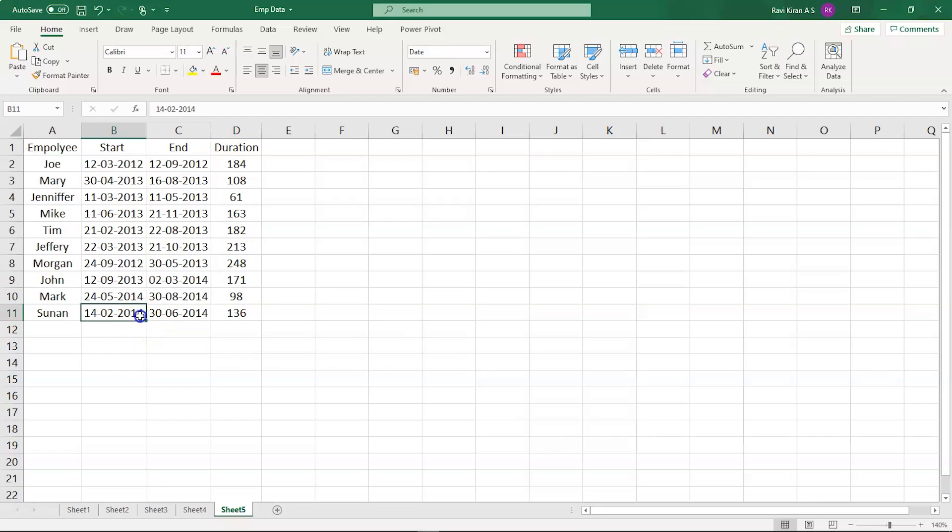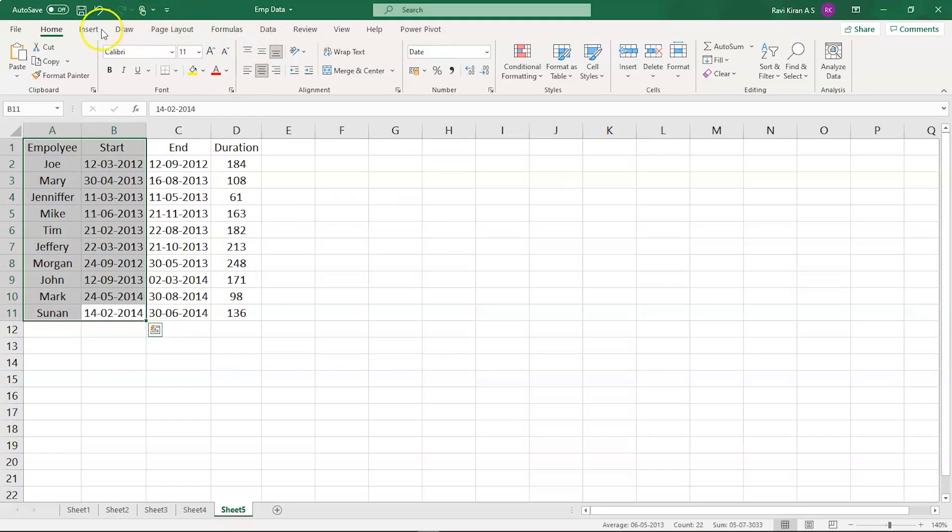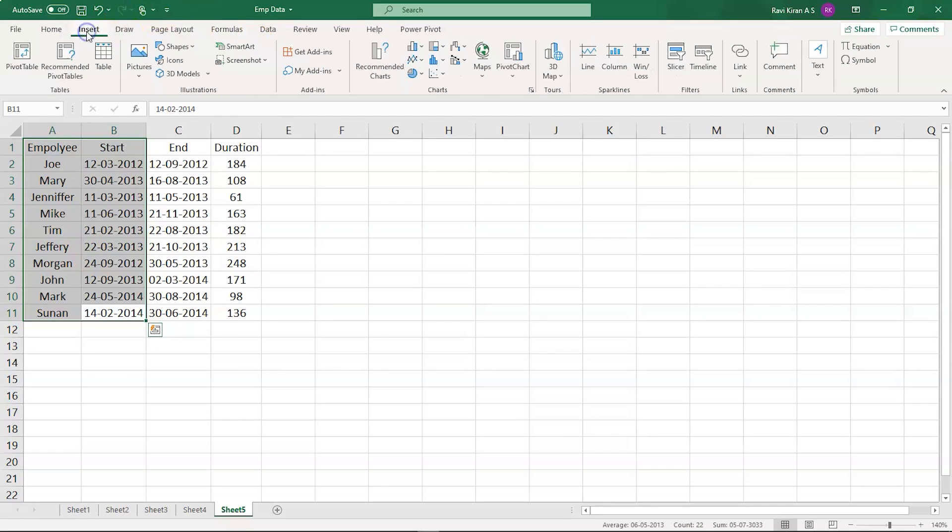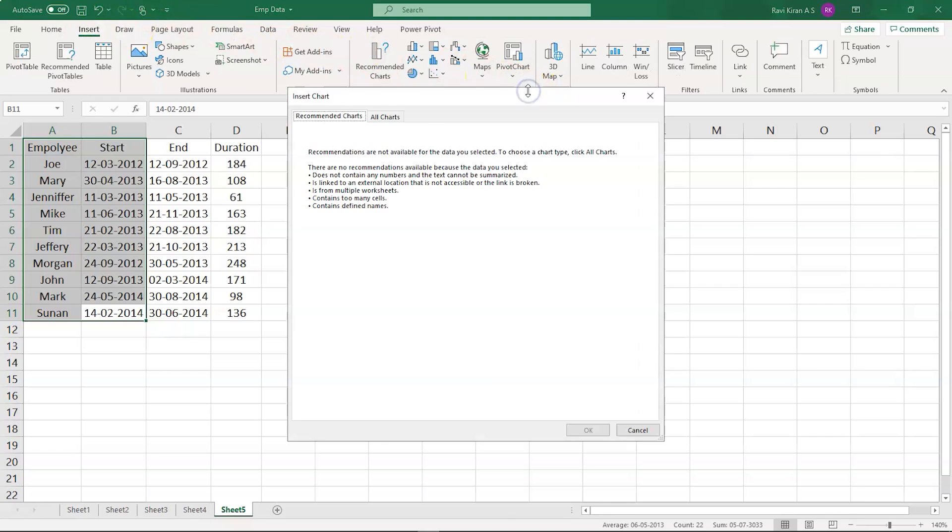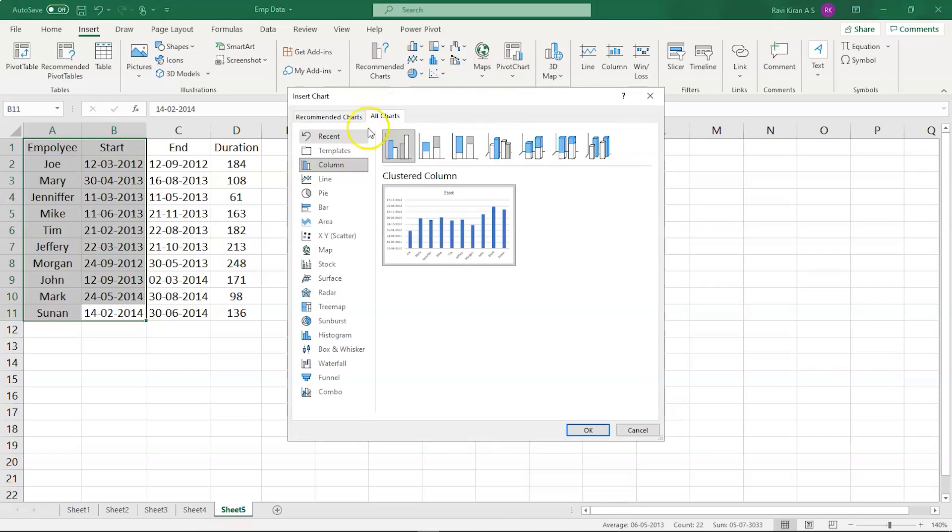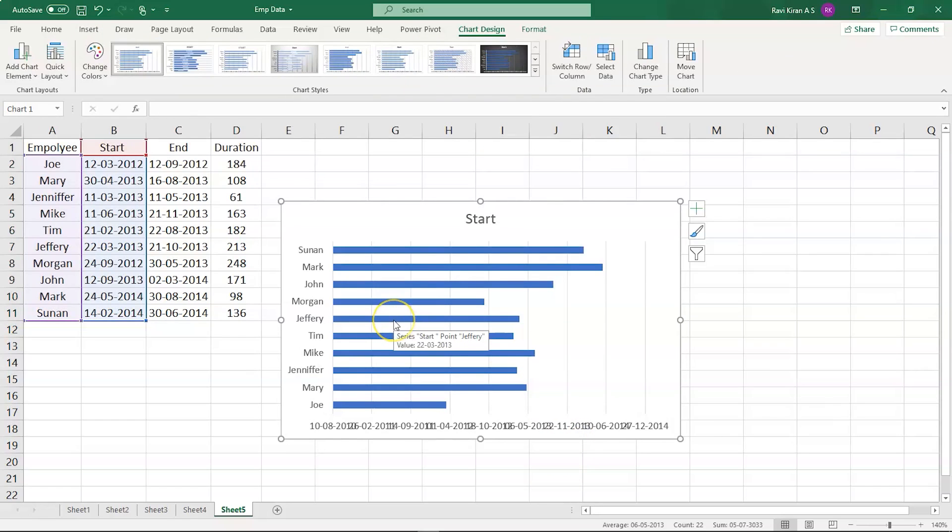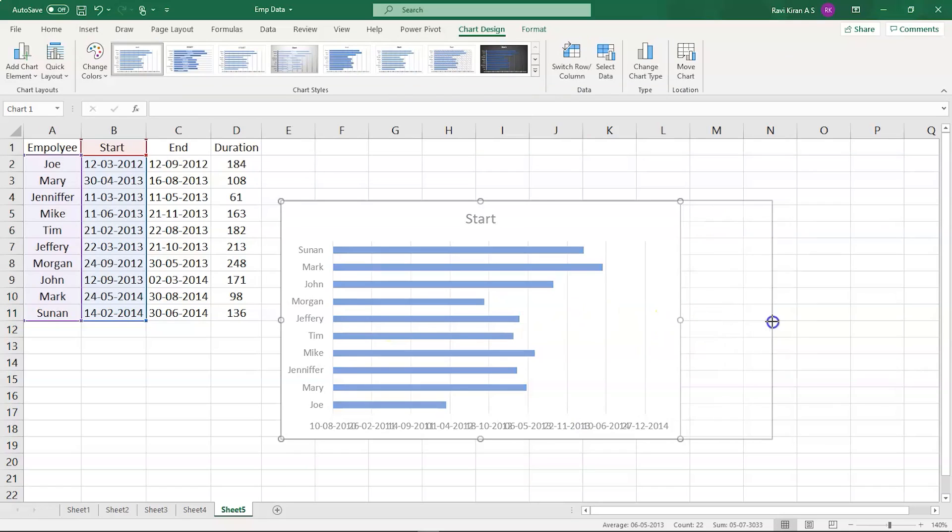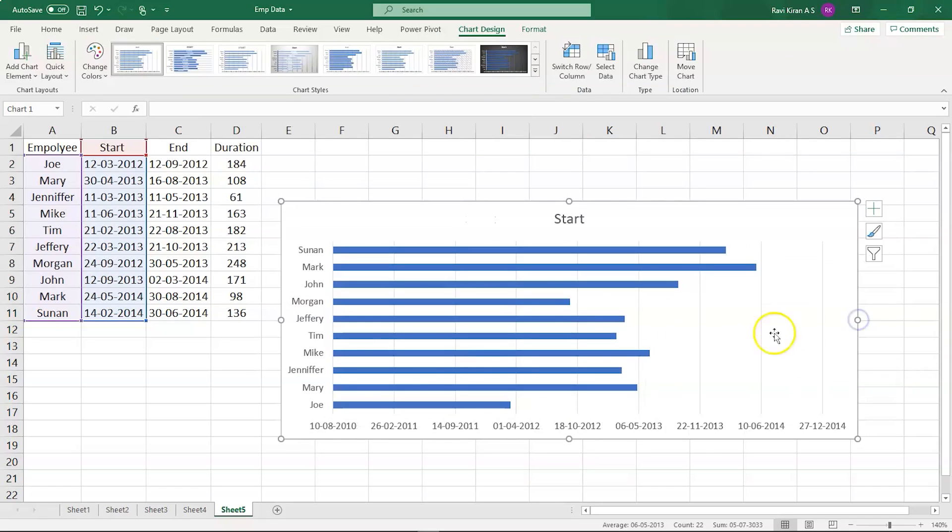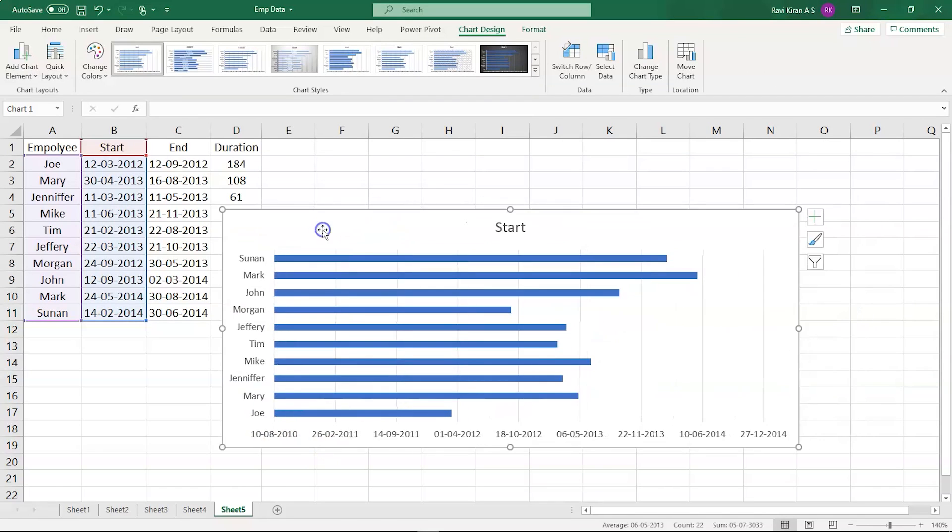To create a Gantt chart is really simple. You just have to select the data and then go to the insert option. In there, you can see the charts icon and select all charts, and in that select the bar chart. Here you can see the stacked bar chart. Select that and press OK. And there you go, you have the stacked bar chart right on your screen. Let's expand this a little more so that we have clear visualization of the dates as well.